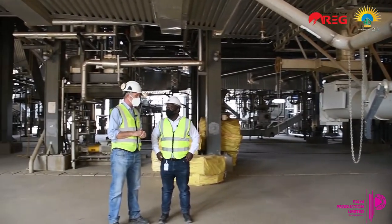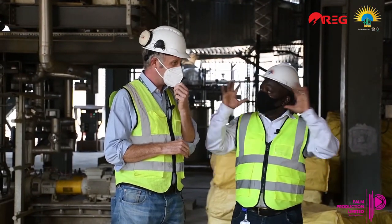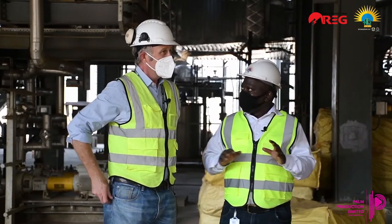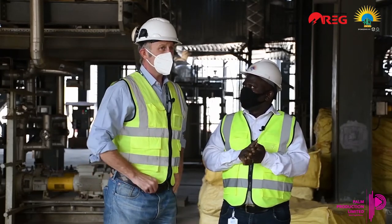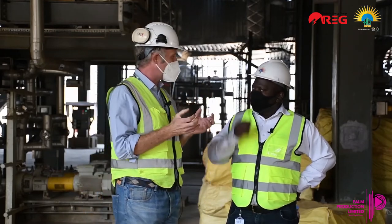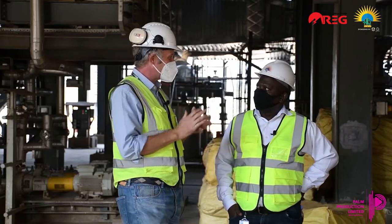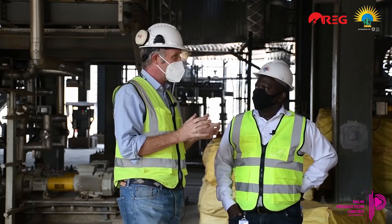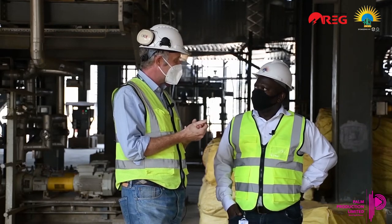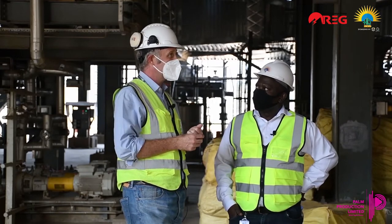Yeah. So talking of local content in terms of construction materials, it's such a huge structure, so how much local content is on this facility and how much imported content? So basically the whole infrastructure, such as the major components, came from outside. Like the boiler materials, obviously there's no boiler manufacturer in Rwanda, so we have to get it from outside. But where we can, pipe materials, bolts, nuts, flanges, fittings, these kind of things are made in Rwanda. Plastic pipe, domestic water systems, and obviously manpower.